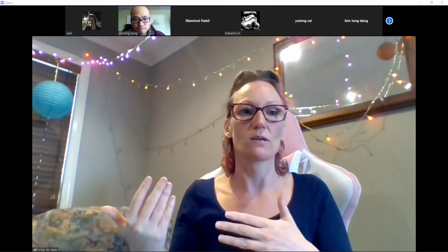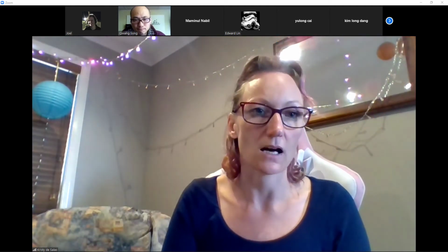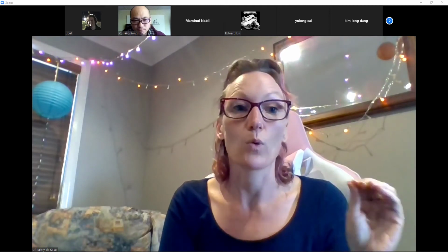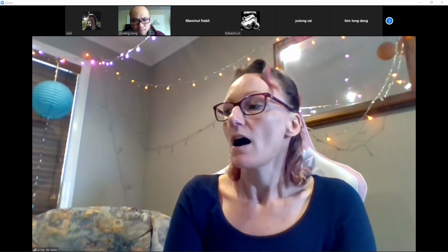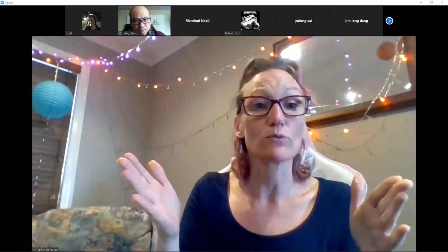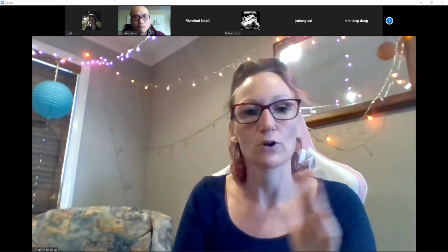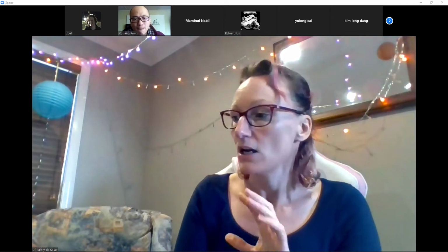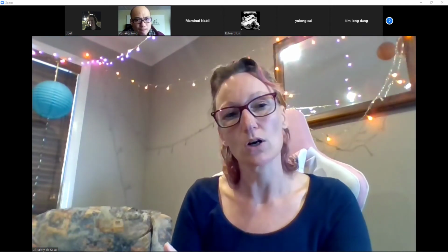And resources in project management mean you. So who is allocated to those particular tasks? And so what this is going to show you is who's meant to be working on which part of the build or the project more broadly at different parts in different weeks. And then you can see really clearly who's meant to be doing what and how it all fits and what has to come first and what has to come second and things like that. You can't figure that out when it's next block.